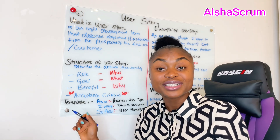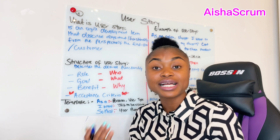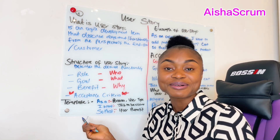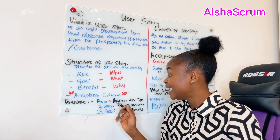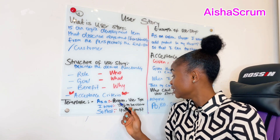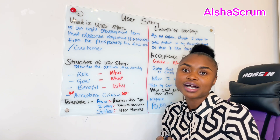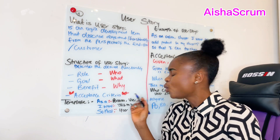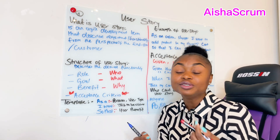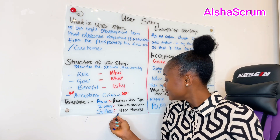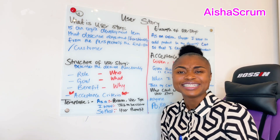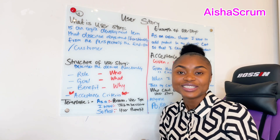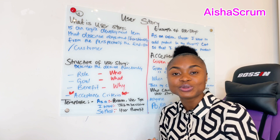These templates can be used in any environment — whether you work in healthcare, finance, or anything else. Regardless, you can apply this template universally. It always starts with 'as a user,' which explains the persona or user type — an online shopper, a visitor, a YouTuber, anything. Then 'I want to,' which is where the what comes in: what do they want, what job do they want done, what new functionality do they desire? And 'so that,' which captures the user benefit — why do they want it. So the standard format is: as a user, I would like this, so that. And always, at the end, you should have an acceptance criteria.